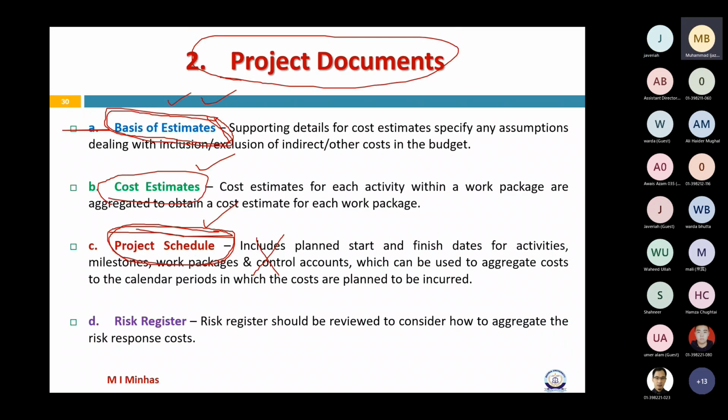In reprogramming particularly, yes. In the beginning, the project schedule and the schedule baseline would be the same, and later schedule baseline 2, 3, because we lock that. It depends, but the schedule is actually the live condition of your project schedule. Once we revise it and get it approved as a result of a change request, only then would that become a new baseline.